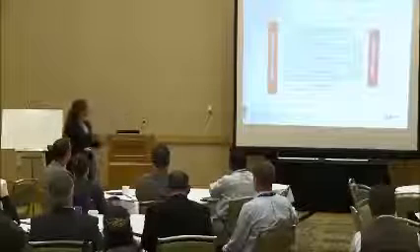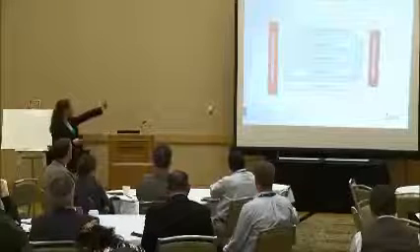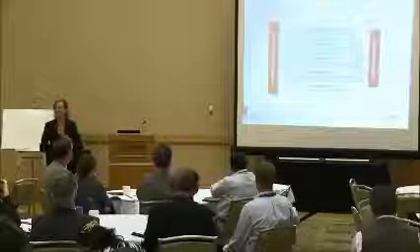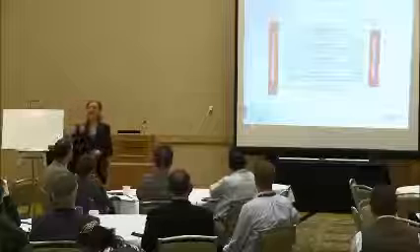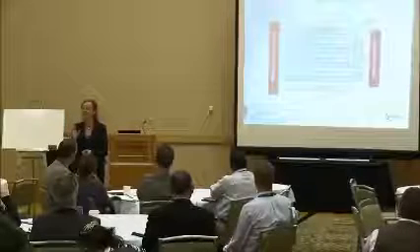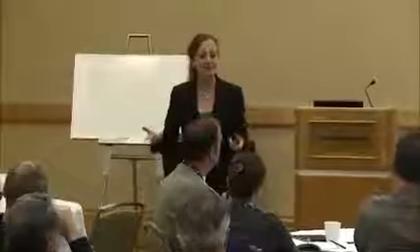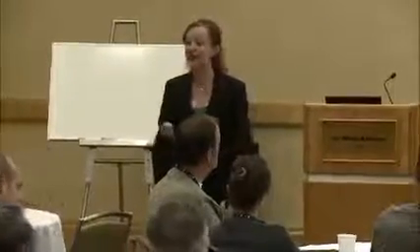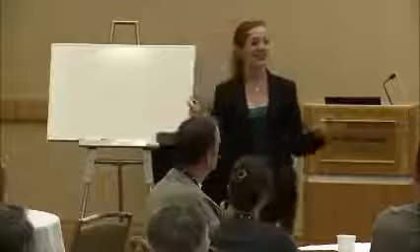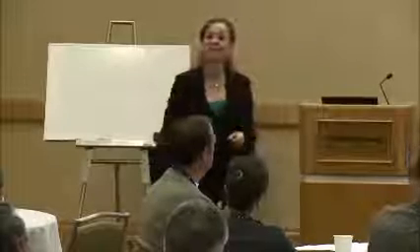So establishing the context is important. The next thing is the arrows and the iterative process. The next thing is, can you see this coffee-coloured box that says risk assessment that sits around a few of those steps? There is a difference between risk assessment and risk management. Risk assessment is the identification and quantification of risk: identify it and measure it. Risk management then takes that information and puts it within a context. You then start prioritising it for action, and implement some resources to reduce the risk. Then you've got communication and consultation, and monitor and review, which are all management methods and techniques. So there is a really big difference between risk assessment and risk management.